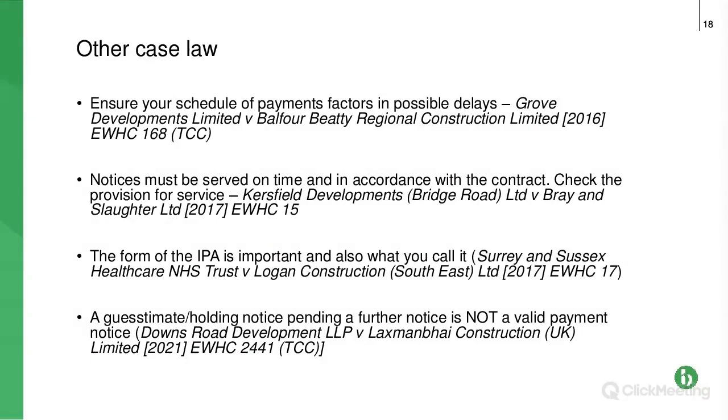And this last case, bang up to date, 2021, only a couple of months old, really interesting for contractors and subcontractors, because again, this is an opportunity for you. A guesstimate or a holding notice is an invalid notice.